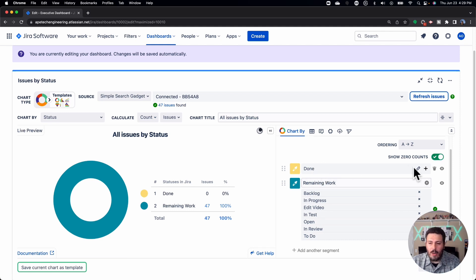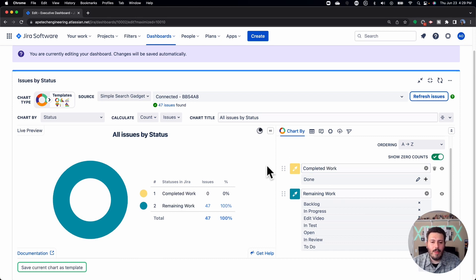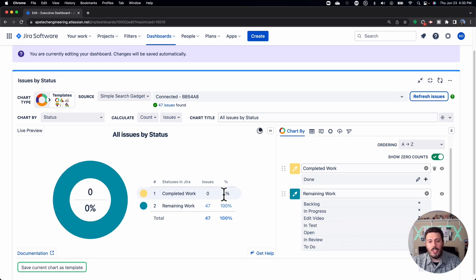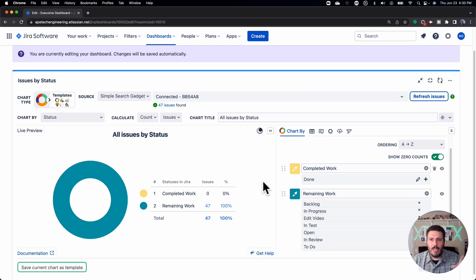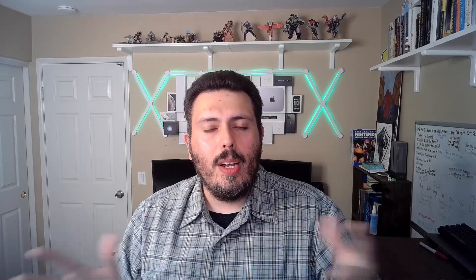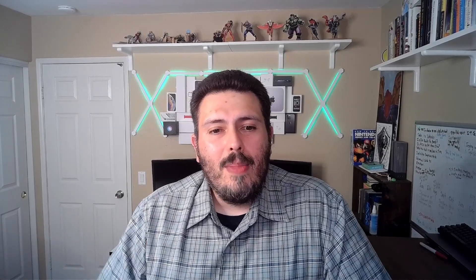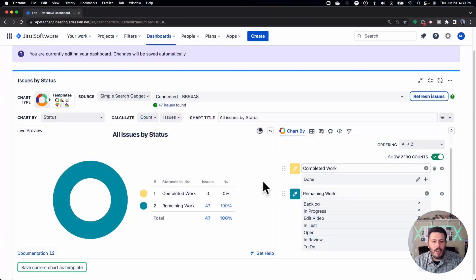Now I don't have done because I didn't have any issues done. But for this case, I'll turn back on the zero. But you can see that it says done, maybe done is not the right word, I can click on the pencil here and put completed work. And now when my executives come and look at this, they will be able to see very clearly, here's my completed work, this percentage is hopefully going to be changing. And then the remaining work, you can see what's actually still outstanding. So this is a great way to take the just the out of the box, maybe you don't have some certain control over what fields your team uses. But when you're telling the story, when you're using the gadgets and the dashboards to tell the story of how your project is progressing, this is where you really have some creative freedom. And I really, really love that custom charts allows you to do this. Because Jira sometimes is just constricted by my admins in such a way that I feel like I can't get value out of it. But by leveraging this functionality here, it's very, very clear to anybody reading this, how much work is still remaining and how much is still completed. So very, very valuable here.